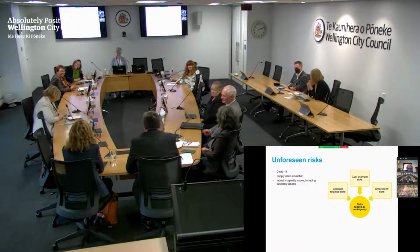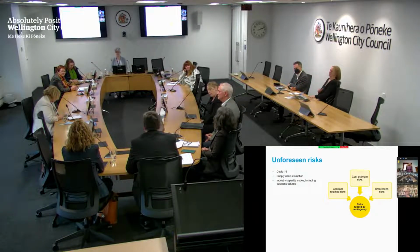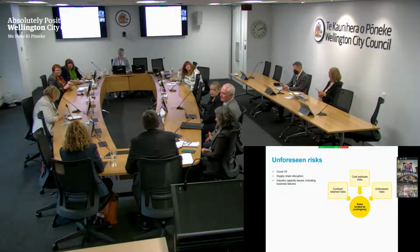Yes. Look, I think the lessons, and there are similar lessons to the St James as well, to be honest, and the Basin Reserve Museum, which is another heritage building, is that you are dealing with old buildings, and the more you try to do to the old buildings, it's very difficult to understand the risk profile when you go into those projects. You are basically on, to some extent, a mission of discovery. So when we went to the St James, effectively we discovered that walls were joined to previous building walls, and you just don't know that. You don't expect it. It's not what's on the as-built plans. So these projects do throw up a hell of a lot of surprises.